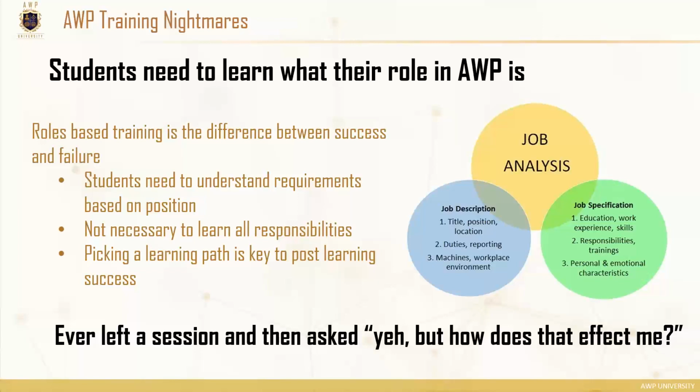I teach a class on P6 development. I don't teach how to use P6, but I teach how to create WBS structures and templates to satisfy the AWP requirements. So how to build a WBS structure that satisfies the proper level 1, 2, and 3. I think the Path of Construction session yesterday from Frankie, if you sat through that, he touched on that a little bit as far as WBS structures and how you initiate them to better structure your project controls environment for AWP. And just like we're talking here, if you take a class on that after you've already got your baseline schedule, you're not going to reverse that. You're just going to understand the mistakes you made, but not be able to put it into practice. So I think on a timely basis, that's a very good add.